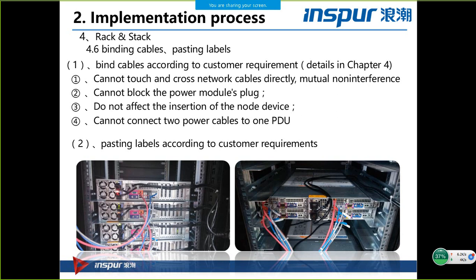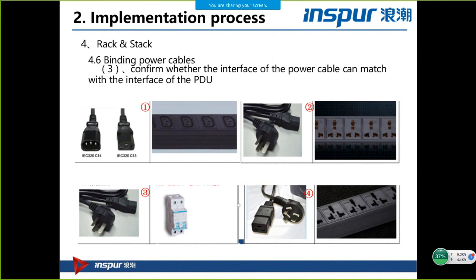Usually, the labels should be printed in advance, and according to our customer requirements, the length and the content of the label, you need to ask our customer what should be written down, and like this.